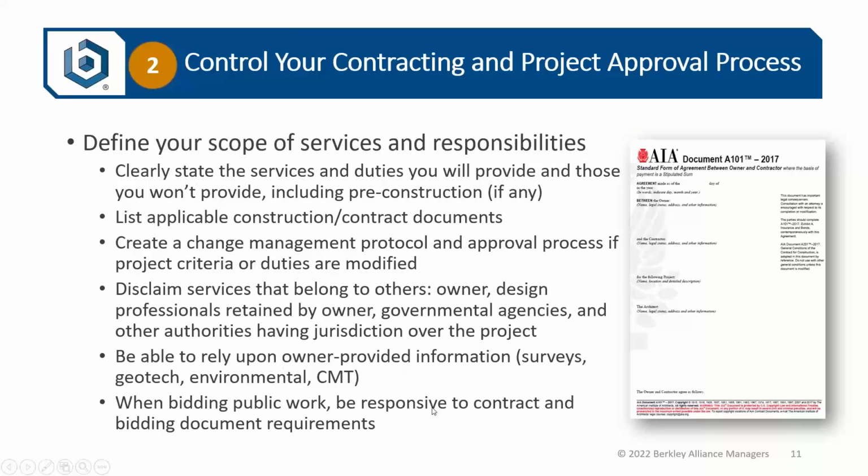they did not do that. So the architect had to make a recommendation to the owner that this bid was not responsive or responsible, and that the owner needed to make a decision whether to accept the bid or to move on to the second bidder. The owner decided to move on to the second bidder, and the low bidder has filed a legal challenge to it. And through my experience, having gone through this a couple times on other public projects, the contractor will not be successful in being awarded that project, and there will be a process of legal challenge and money spent on attorneys and other things.